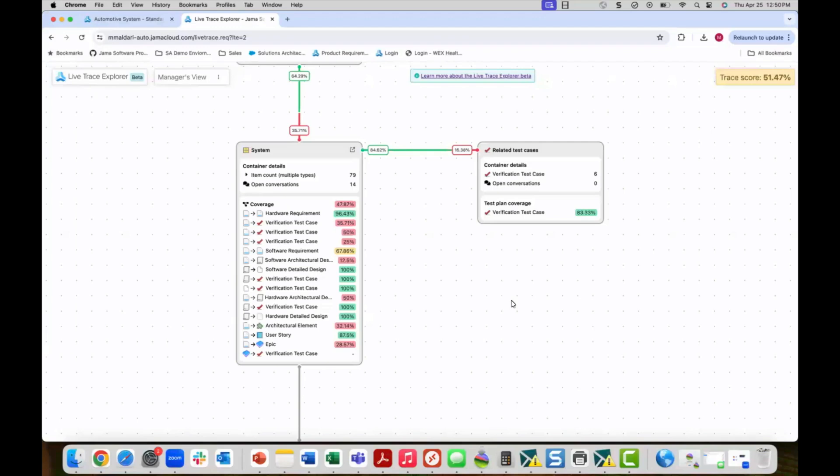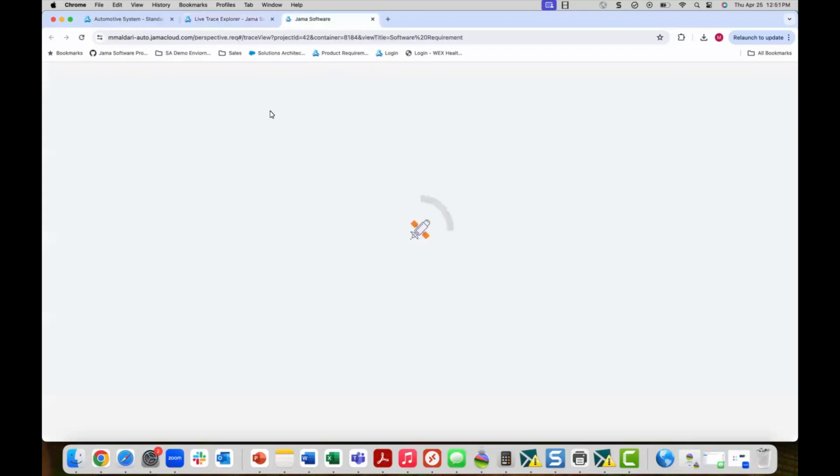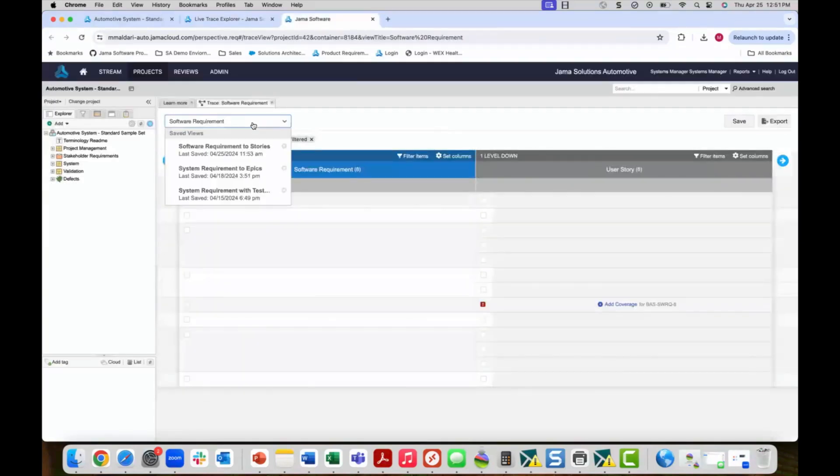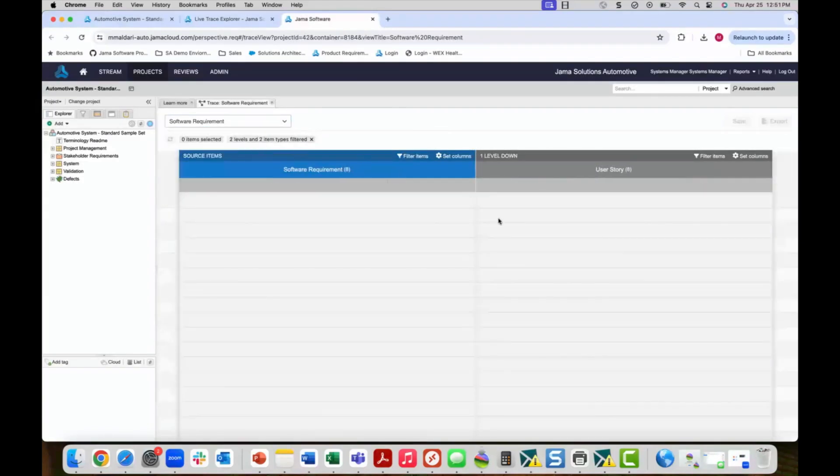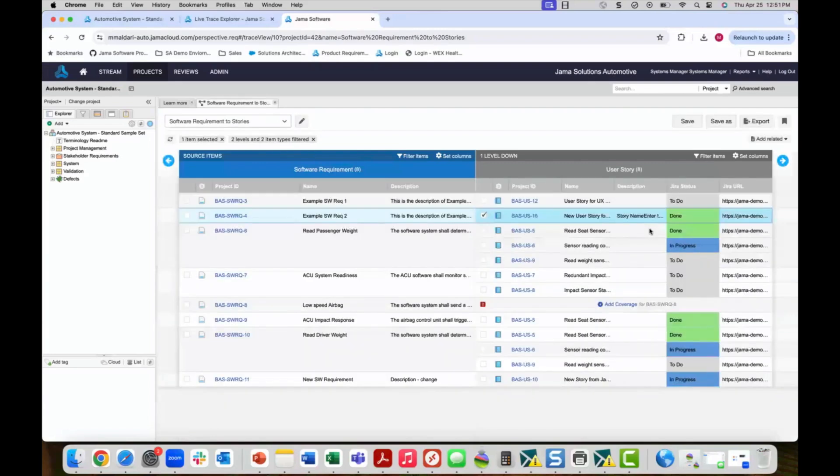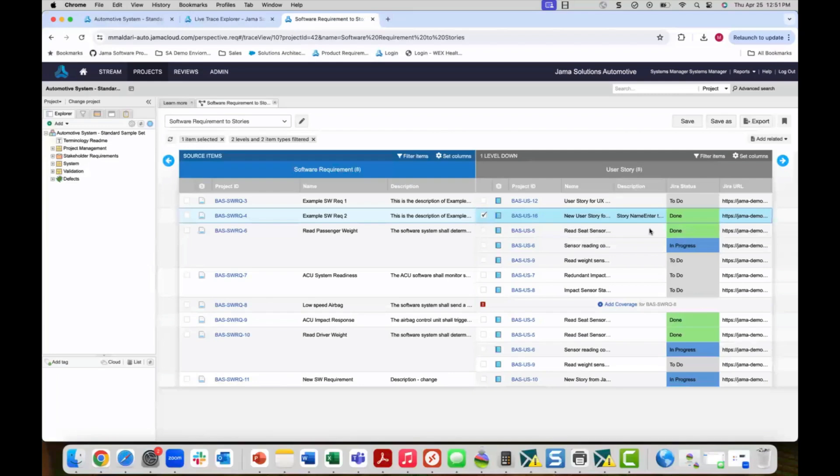A systems manager can use the live trace explorer to drill into the trace view for software requirements to user story relationships in order to check various state changes and overall status of the user stories that are being worked on in Jira. This information automatically comes over to Jama so that the project is always reflecting the current state of work. The development team never has to leave Jira. In the case of our newly created user story, you can see that it is now in the done state indicating that development work is complete.